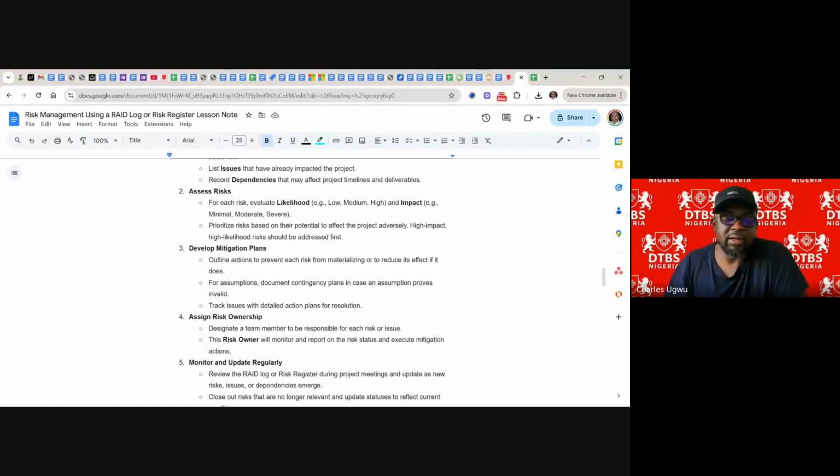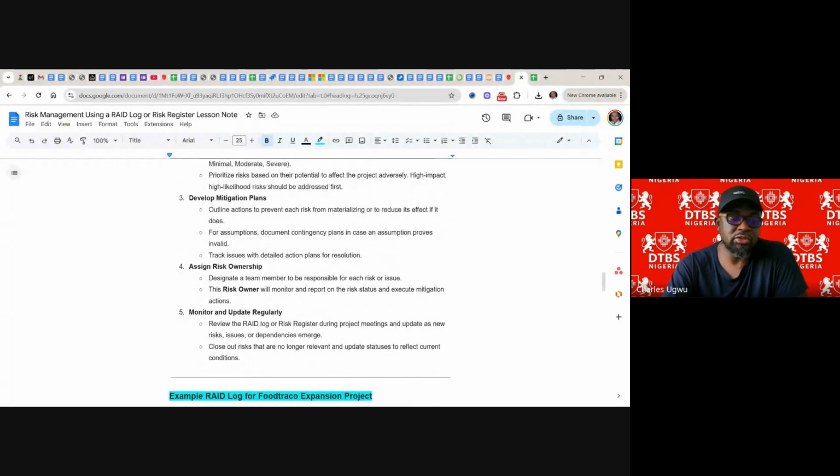A designated team member should be responsible for each risk or issue. The risk owner will monitor and report on the risk status and execution, and monitor and update regularly.